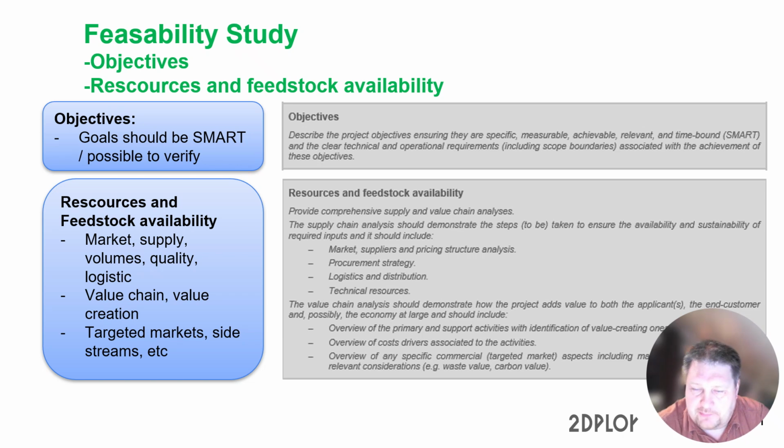The product was approved, but then it turns out that the production capacity was only some percent of our total need. So that led us to a phase where we really needed to redevelop and change our technology, which turns into a massive cost and a time delay.